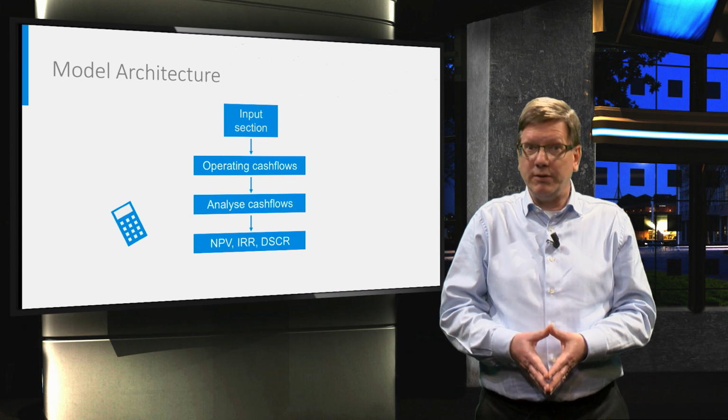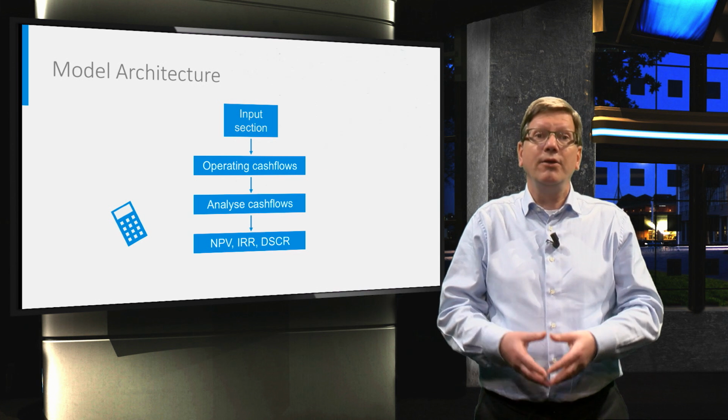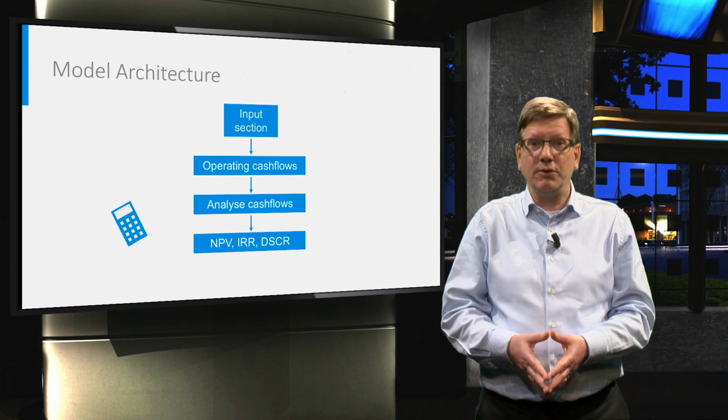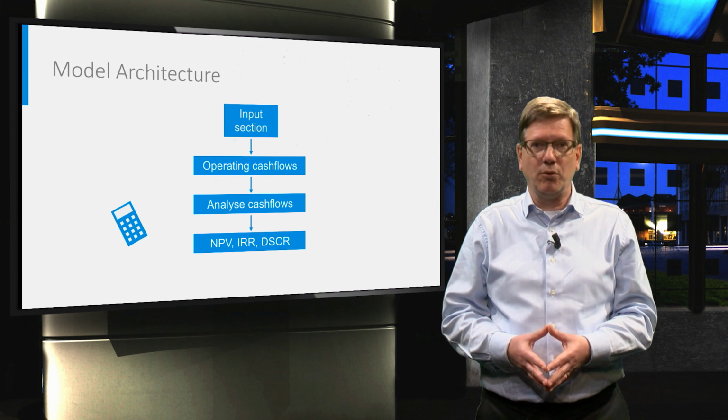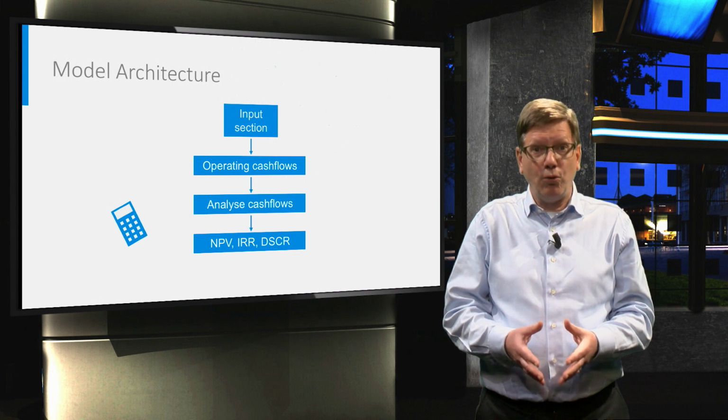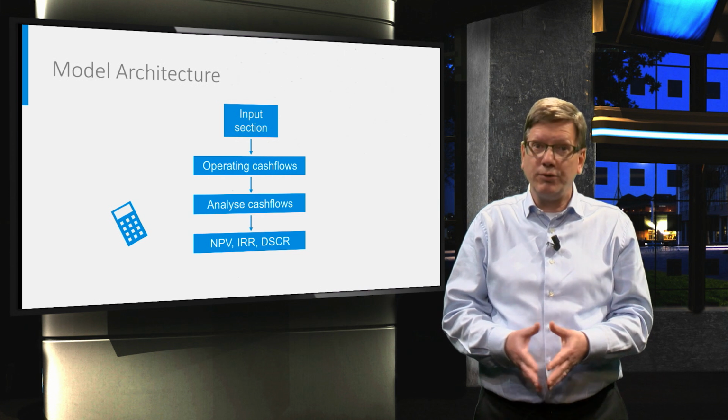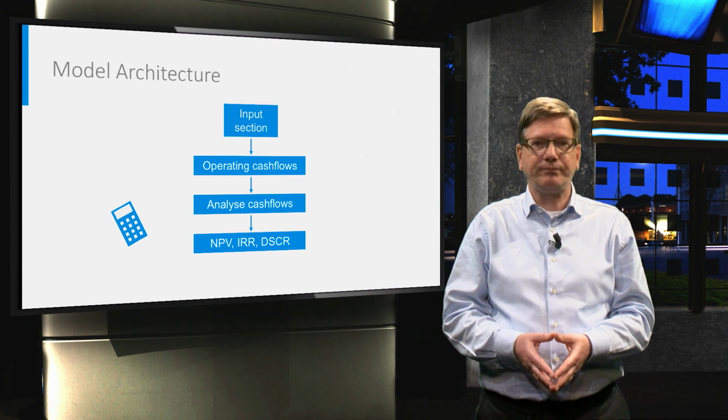It's therefore important that we log carefully the source of all the inputs that we use. In large projects, this is often done in an assumptions book. This is a book that records all assumptions and the sources they originated from.